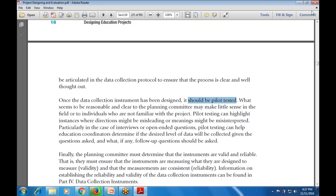Pilot testing is particularly important in the case of interviews or open-ended questions. It can also help education coordinators determine whether the desired level of data will be collected, given the questions asked and any follow-up instructions provided.